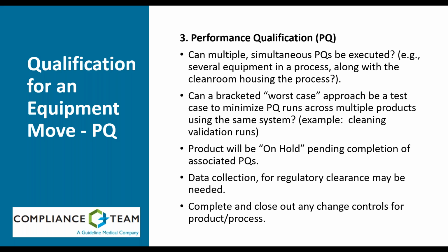You're going to have time for data collection, sign-offs, and it could go back and forth a few times. Again, sign-off parties are a lovely situation for this, where you can resolve your issues in one meeting, get the document picture perfect with all the affiliated parties in one room and get it done all at once.